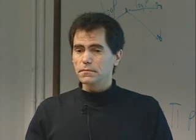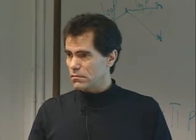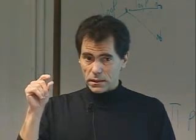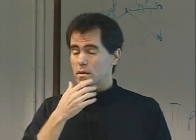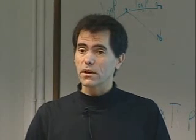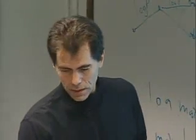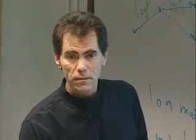And so you take each of the error terms, and for Chandra we probably had 100 or more, and you go through and you verify that your assumption in that error budget term was correct. Usually for the critical ones you did it in more than one way, more than one method, so that you were sure that you had those error terms defined. And the end result was we had mirrors that performed better than expected.